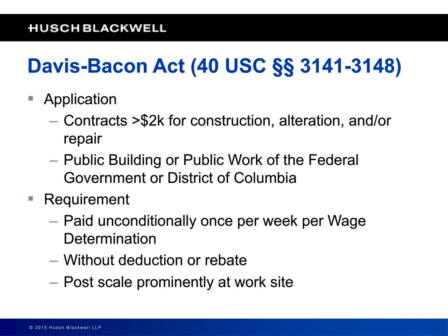It requires that workers that work on jobs like that be paid at least weekly according to a wage determination established by the Department of Labor for the project. Secondly, it requires that you not deduct anything from those wages except for deductions that are permitted by law, things like taxes. And then the final thing it requires is that you post the wage scale prominently someplace at the work site so workers can see it. And that's all the Davis-Bacon Act requires.